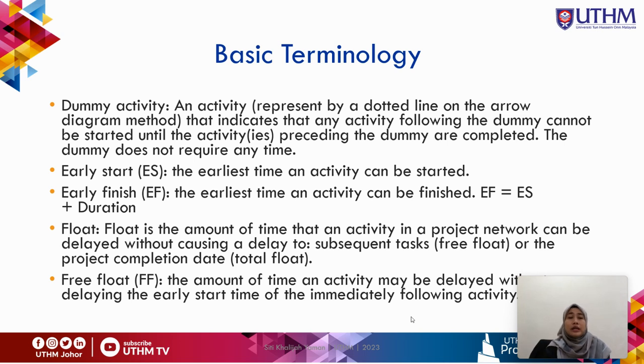And then you have the early start, early finish. Early start means the earliest time or the earliest date that you can start that particular task. And early finish means the earliest time that you can complete the activity. Early finish you can calculate based on early start plus the duration of the task.